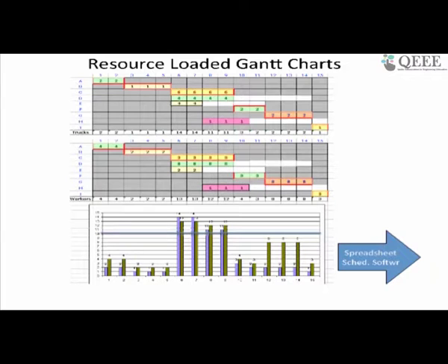I think something like just Microsoft Project will be able to handle a problem of this simplicity. Okay, it will either say the resource over-allocation cannot be resolved, or it will extend the project duration, or it will find the float to be able to allot it appropriately. Now sometimes if you are not able to resolve over-allocation where multiple resources are concerned, you will have to give priority to a resource and allot it appropriately that way.